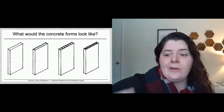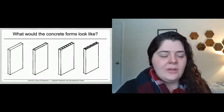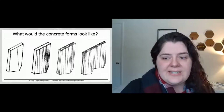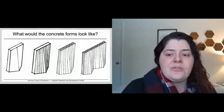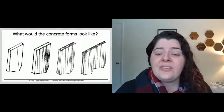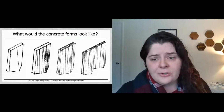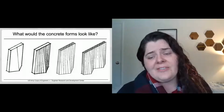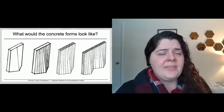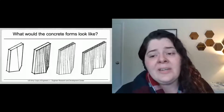And then as you get bigger and bigger and you expand this wall section into an actual full-scale house, you need to understand that all of these components, even if you 3D printed the formwork, or even if you CNC'd the molds to make these objects, all of those things have a limited lifetime. Depending on who you talk to, wood forms can only be used for like 3 to 5 times if you're lucky in these kinds of environments. And metal forms tend to only last maybe a dozen. And even before that, you need a welder to come in and fix them.